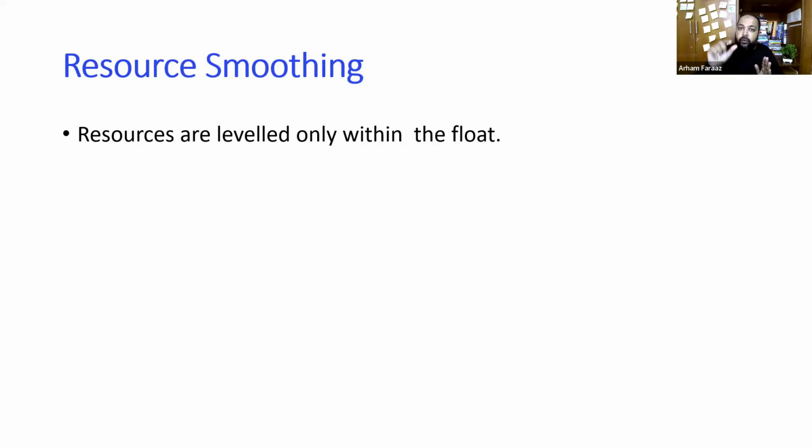So wherever you see float, the extra 6 hours or 14 hours of work somebody is doing, you'll ask him to do during the float of the project. This optimizes the resource project and people are happy to work like this. Okay, so these are 2 resource optimization techniques, resource leveling and smoothing. So remember the subtle differences for PMP examination.